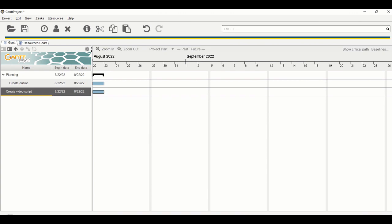Click the Demote option, and now you can see that 'Create Outline' and 'Create Video Script' both belong to the Planning category. The parent category will have a black bold arrow to indicate it is the parent. Next, let's add duration.